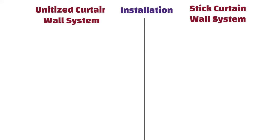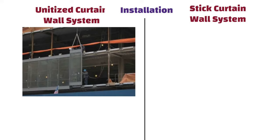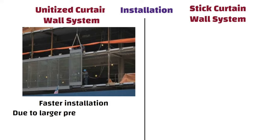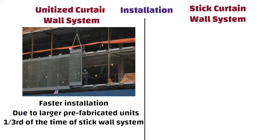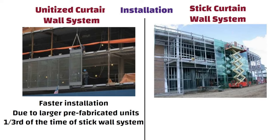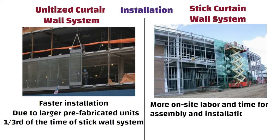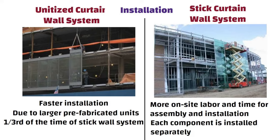Installation: Unitized systems are known for their faster installation on site due to larger prefabricated units. For installation, it takes one third of the time of a stick wall system. Whereas, stick curtain wall systems require more on-site labor and time for installation, as each component is installed separately.